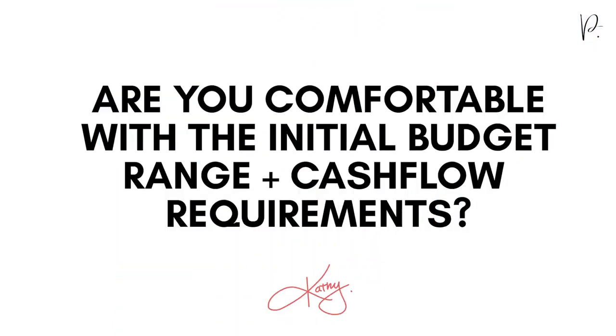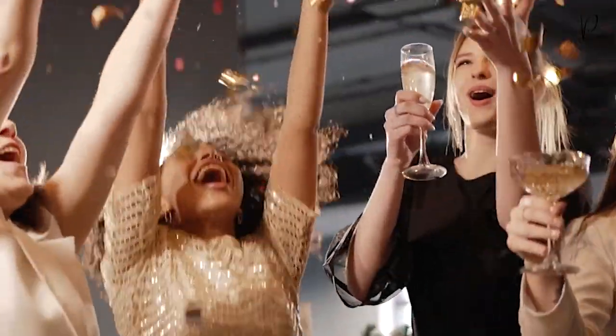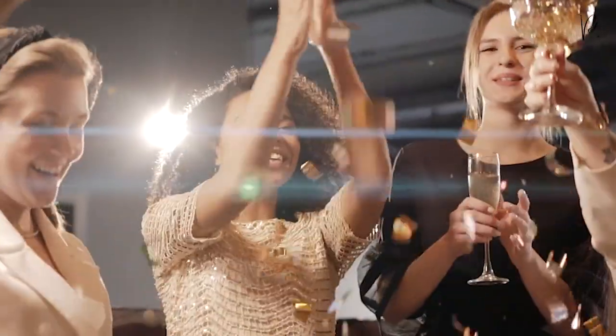After you have all of this information, it will boil down to one simple question: are you comfortable with the initial budget range and cash flow requirements? If yes, congratulations — you can proceed to the next part of your project. If no, then you need to take a step back and re-evaluate: either bring your scope of work down or bring your budget up. Regardless of your answer, the information you now have will give you the confidence to make a great decision for your specific scenario.